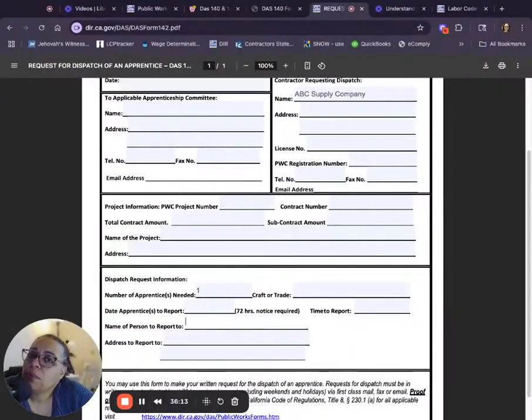Name of person to report to is going to be a foreman on the job site for our client. And you can ask them, hey, who's an apprentice going to ask for? Maybe it's Dave and here's his cell phone number. The address to report to is likely going to be the project address. However, we have had clients that want this address to be the same as the company address because they want to do background checks and they want to do a drug test and they want to have them fill out the paperwork. So again, don't assume, but just double check.